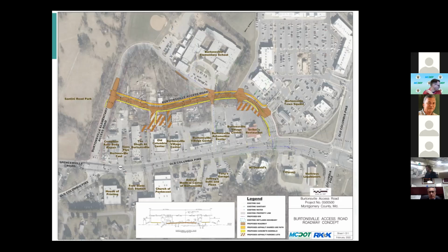But absolutely, as he mentioned, our ears are always wide open. He's met with these property owners to inform them about the project and hear their concerns, and we certainly are always open and willing to continue to do so. I just wanted to underscore what he was saying and clarify that the property acquisition component is when our real estate folks will go out, meet with the property owner, and make an offer based off of an appraisal. And that is correct. We just don't have the information to do that until the plats are final.